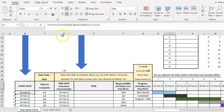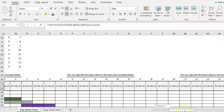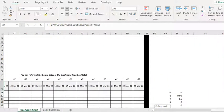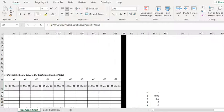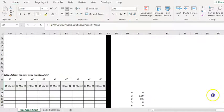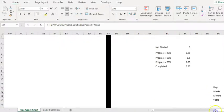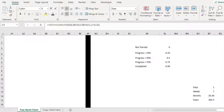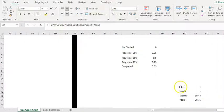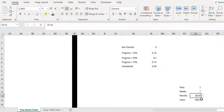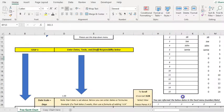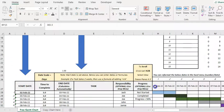So that's the what's the date and then look up how long that is. And I've got a table over here at the side. Right over here. So it looks up day, we add one day, weeks, we add seven days, months. That's the average number of days in a month and number of days in a year, roughly. So that's how that's calculated.